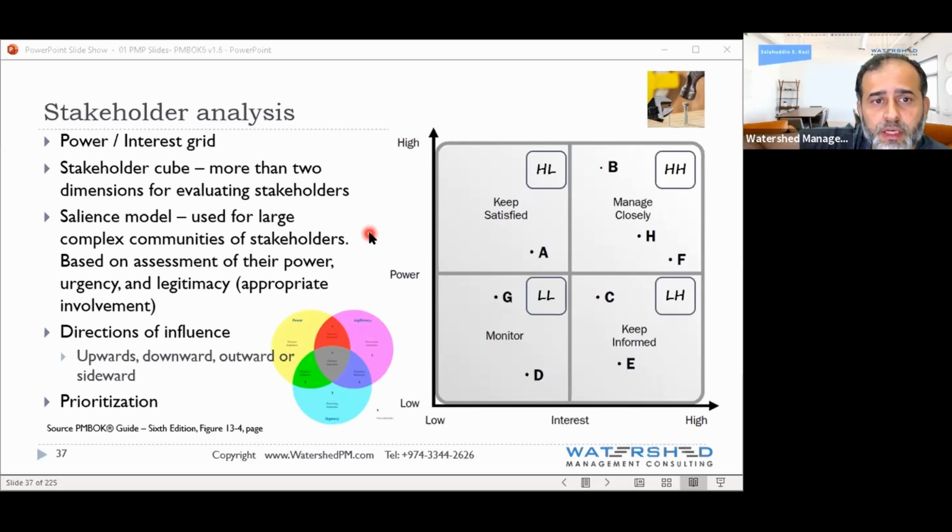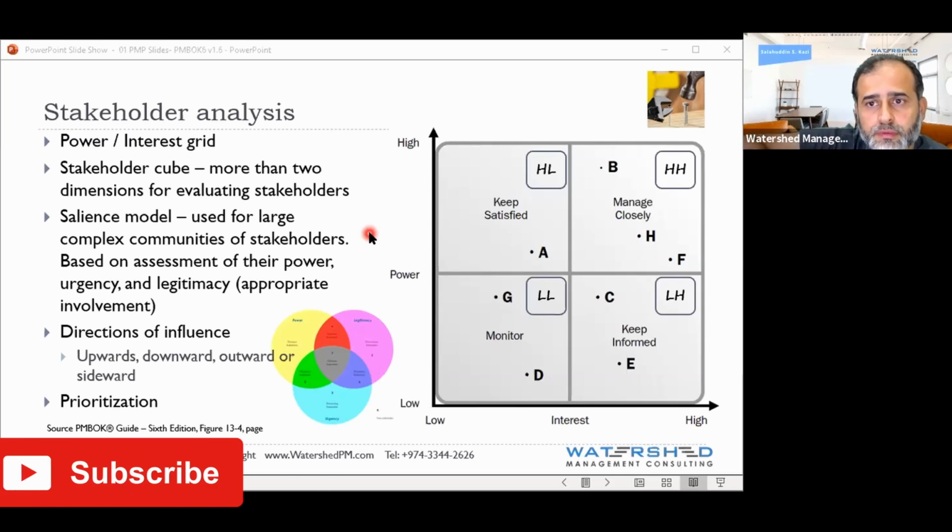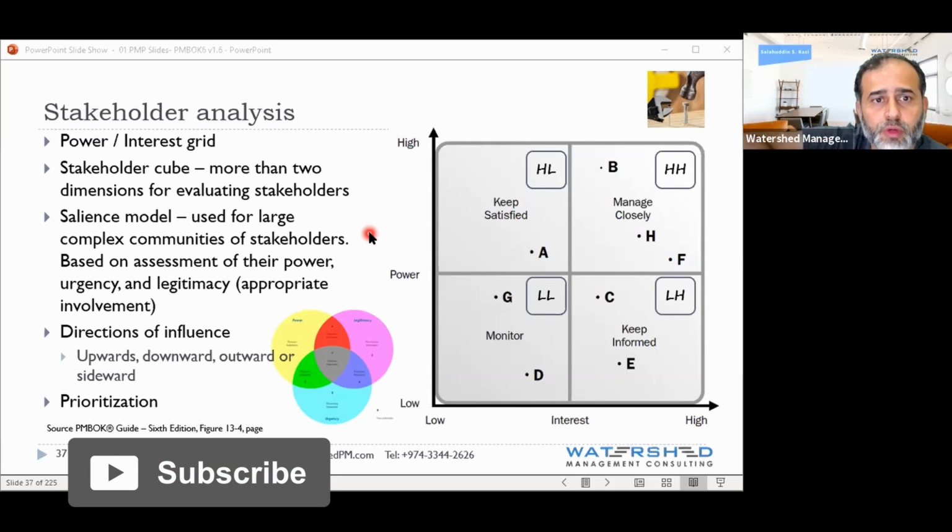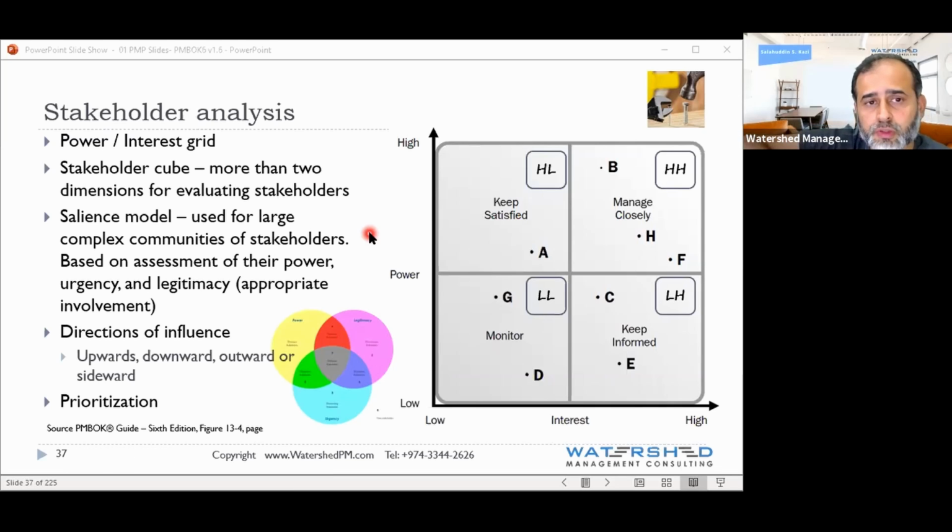Even the team's ability to make the project successful is a big thing. So high power. And normally they will do everything they can to make the project successful. They're affecting, they're contributing, they're making the project successful. So the power is high. Make sense? Now this is one criteria, power. Everybody clear with how you give a power score? Look at the degree of effect the stakeholder has on your project. Give a scale of 1 to 10.